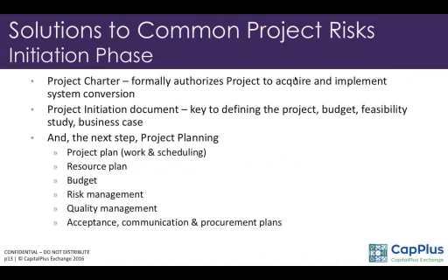Yes, I think the first thing that you need to do is create a project charter, which is the formal authority to undertake the project. It has to be in terms of a document describing, and this document has basically been described in the toolkit. It sets out in clear language the mission, objective, and deliverables of the project. Define stakeholders. You need to define the project team and any third parties or external resources required.